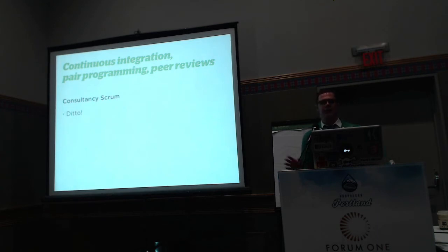So to get into the technical stuff for just a moment, we do something called feature branching. So every story on a project has a feature branch in GitHub. So somebody takes a story off the backlog. It says, as a user, I need to log in so that I can post content on the site and demonstrate engagement for that client. That's story number 72. So now we have a feature branch in GitHub that is story 72.